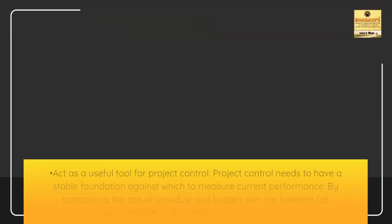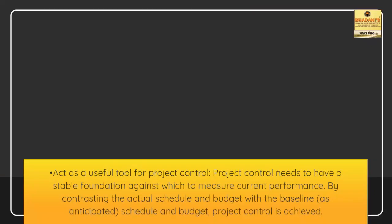Act as a useful tool for project control. Project control needs to have a stable foundation against which to measure current performance. By contrasting the actual schedule and budget with the baseline, as anticipated, schedule and budget, project control is achieved.